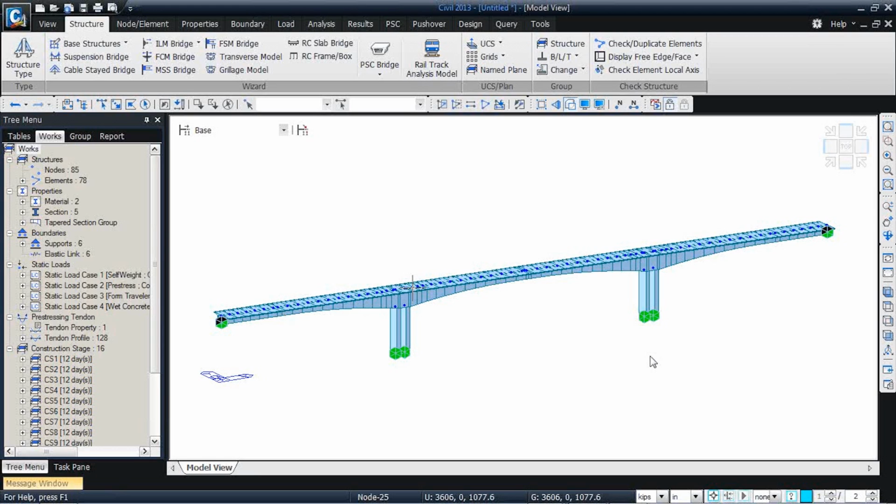bill of material. And therefore, since the cost of steel is much higher than concrete, it is only the post-tensioning that they can really control and come up with a better or a winning combination of bill of material and the presentation.